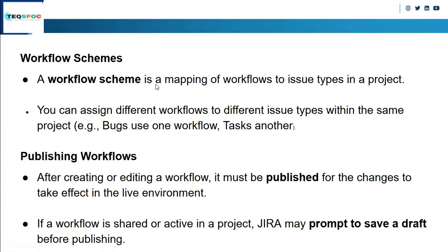A workflow schema is a mapping of a workflow, that is a new workflow or issue type, to your respective project. Whichever project you want to add, you can add to with the help of workflow schema. Then after adding, you have to publish the workflow. After creating or editing the workflow, it must be published. Now, if a workflow is shared or inactive in the project, Jira may prompt to save a draft before publishing. This we will see practically.